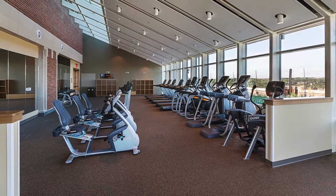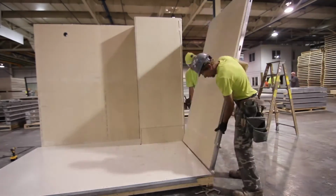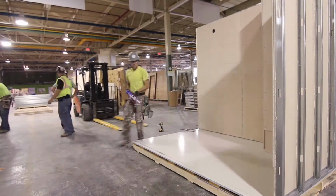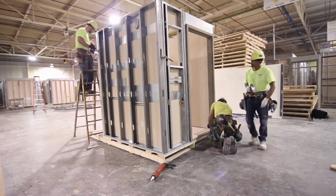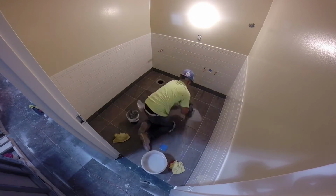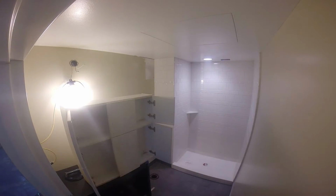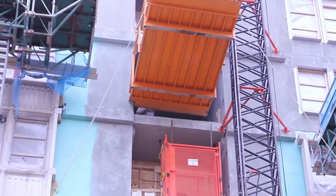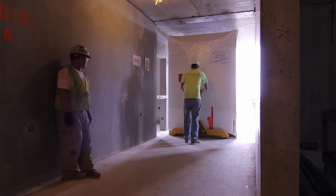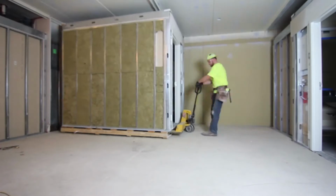A precast concrete structural system was used for the entire 8-floor building. Wallbridge met a modularization challenge by managing construction of 730 bathroom units at a prefab plant it created 10 miles west of campus. Using BIM provided for the streamlining of routes to lift the units into the building and wheel them through corridors still bustling with construction.